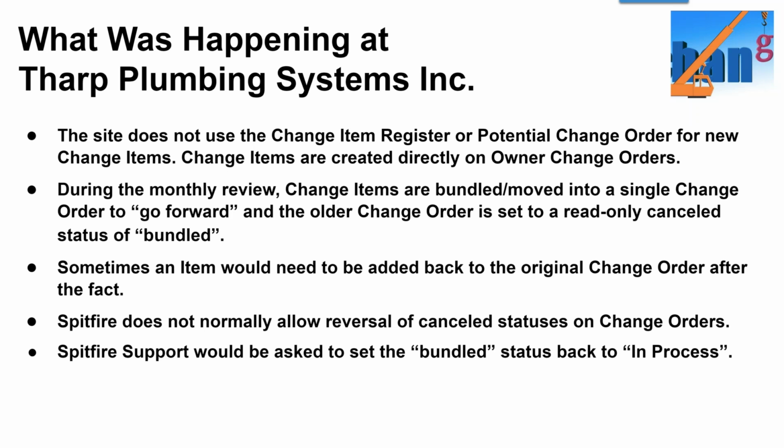As Sony just mentioned, not every client listens to the way Spitfire says stuff can be done, because there's traditions, there's old ways of doing things, there's a desire for simplicity even. So at THARP, they were used to, we don't need the change item register, we don't need potential change orders, even though clearly they're dealing with what we would think of as potential changes. They focus entirely on owner change orders.